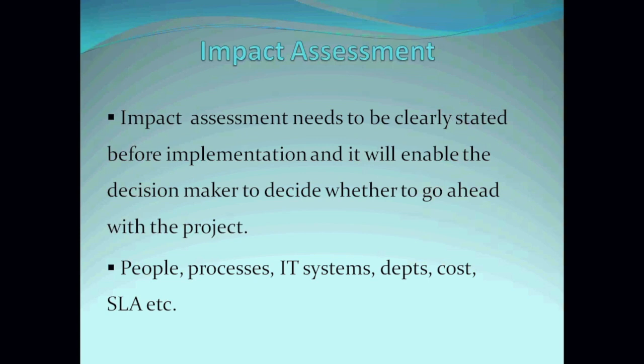And also one other thing that I need to talk about is the impact assessment. There are some projects, not all projects, but some projects or some organizations, that will ask you to carry out an impact assessment. I've done it before, but not all my roles have involved it. The impact assessment is to examine what impact the project is going to have, maybe on the staff, the technology, the resources, the people, the processes, the data. It's just to assess all those key areas, to see whether there's going to be any impact if they implement that project.